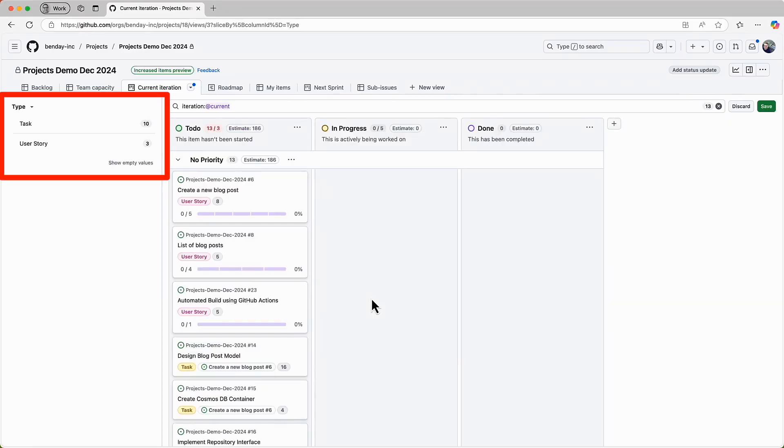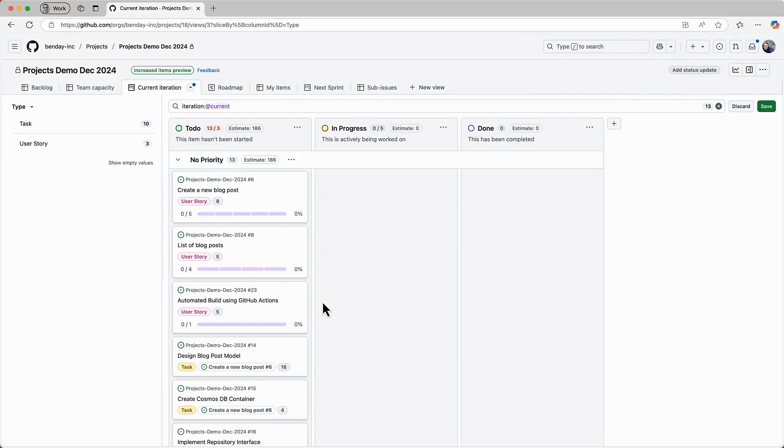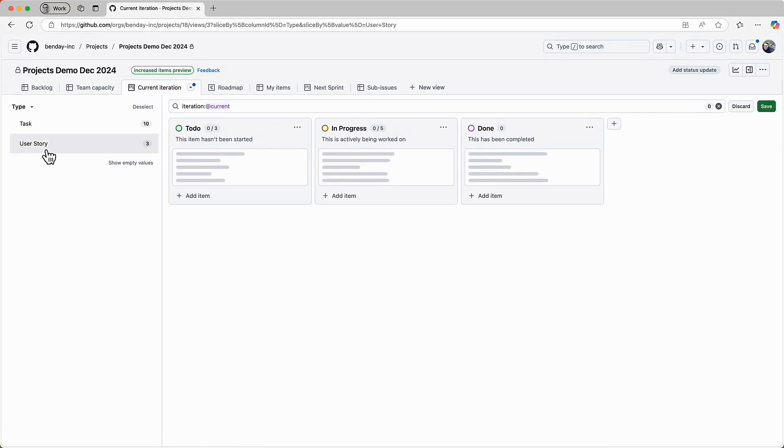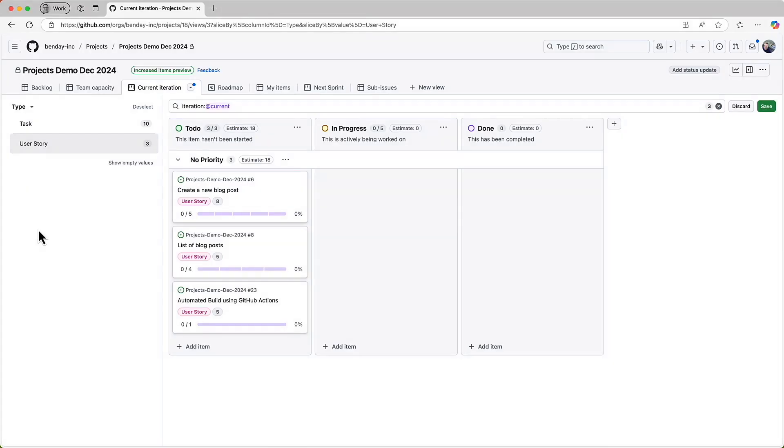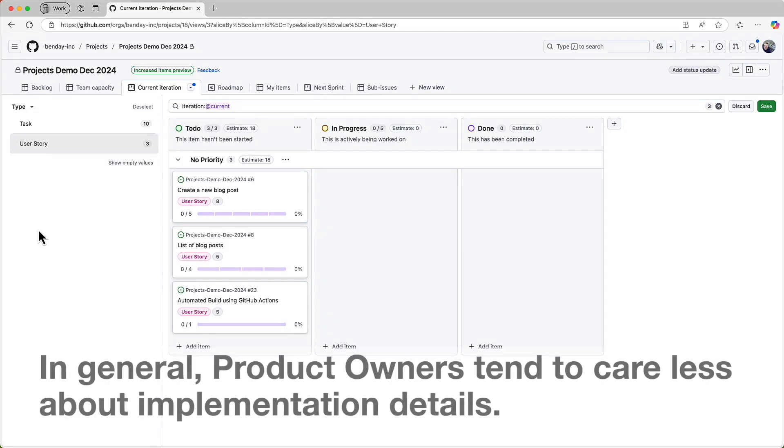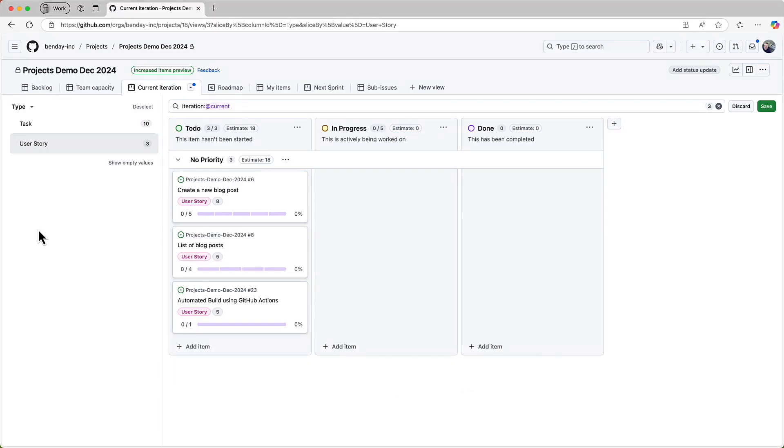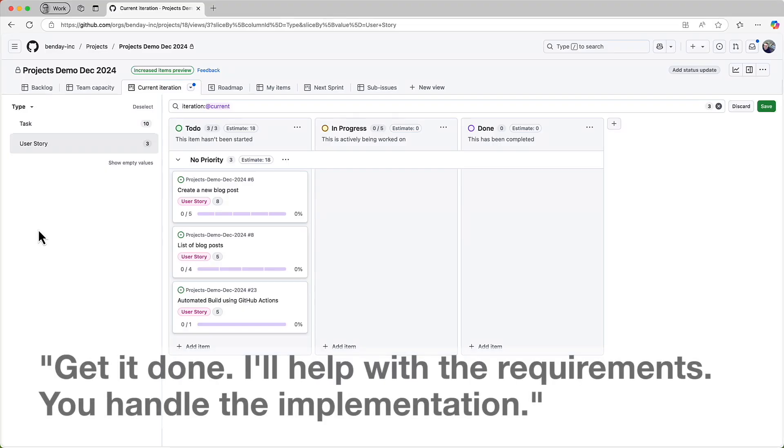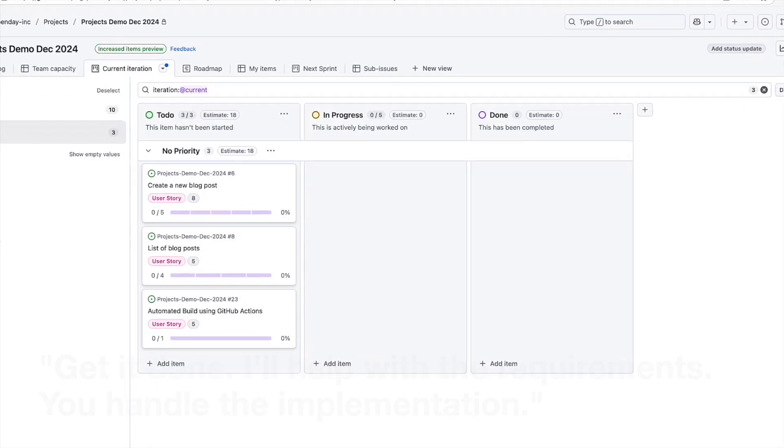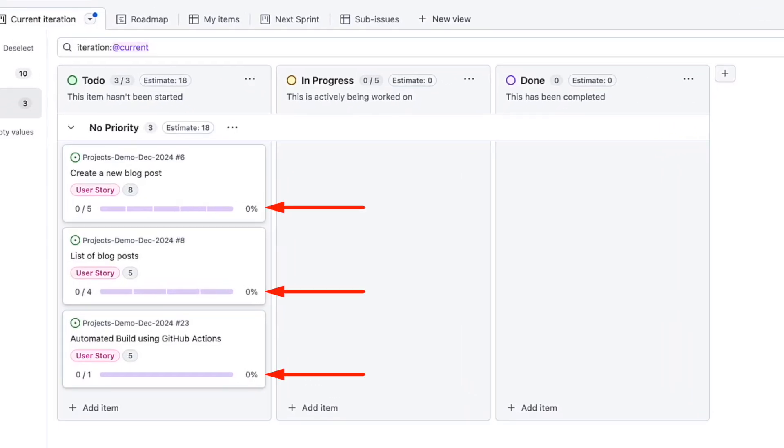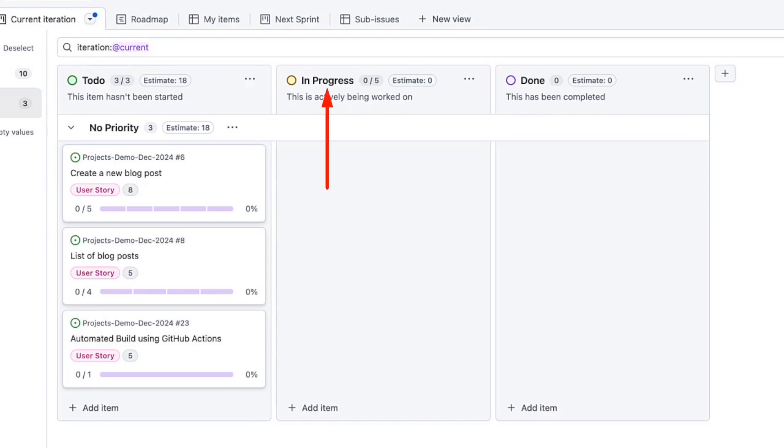Now, why do I care about slicing by task versus slicing by user story or PBI? Well, if you're in the daily scrum, each of those tells a different story. Let's choose slice by user story and discuss that first. This is probably the view that the product owner cares about most because that person is primarily concerned about feature delivery, not task delivery. The tasks for each PBI are the dev team's plan for how to make the requirement done. If the tasks aren't all done, then the PBI isn't done. If you think about the case of a non-technical product owner, he or she might not really understand what the tasks are about, or even care about the tasks. The sub-issue progress display is interesting to that product owner. It gives them a rough feel for what percentage of the work for that requirement is done without getting stuck in the details. But what the product owner really cares about is which requirements are done, which are in progress, and which haven't been started yet.